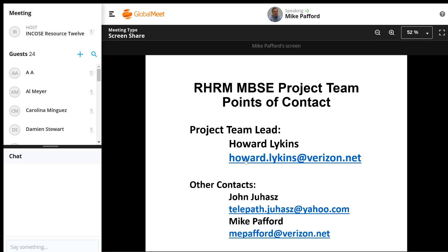And one thing that we've used that really helps in that respect is what the Agile software people use, epic user story writing. There are good books out there on how to capture the user story at the epic level, which means what we would call the system level. So we use that a lot. Because that format is, as a system level decision maker or role, I need the following capability from this solution in order to do my system level role. And so we use that a lot.